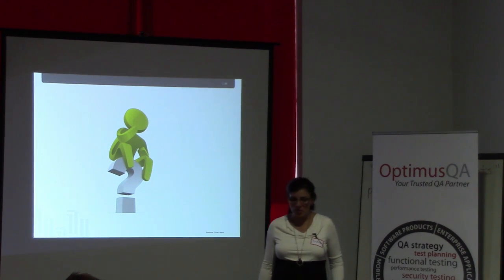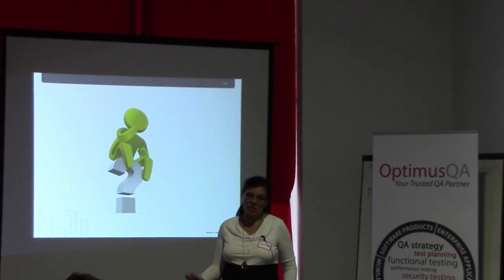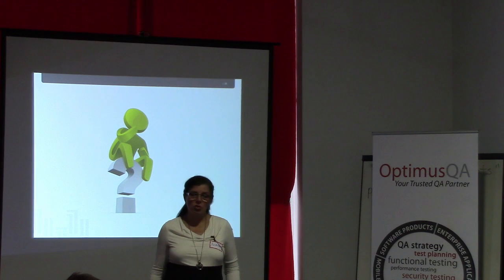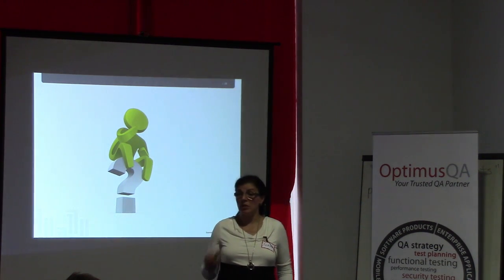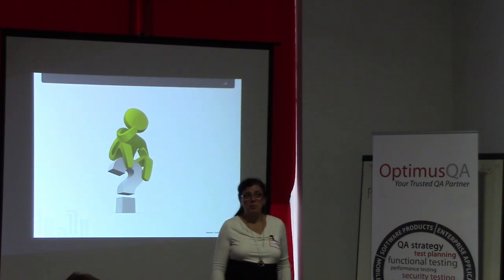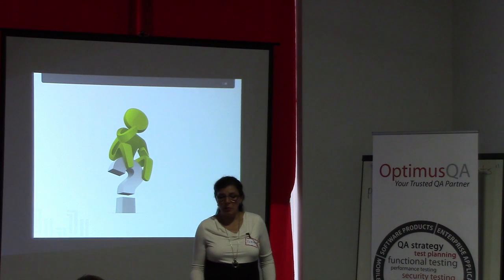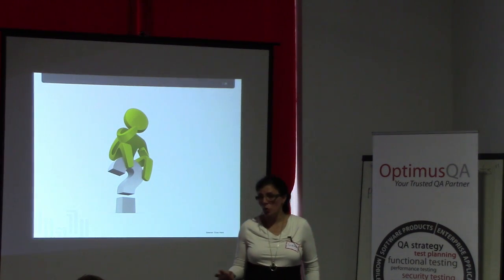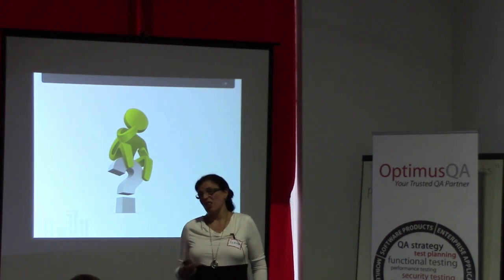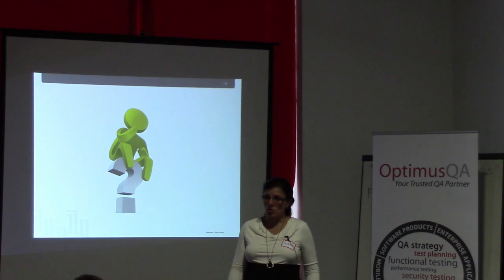So what we do, we use Inotas. Inotas is the online tool that our project managers use to fill out the demand for each project. So they will say, for example, for PFM, I need 280 hours. And the month has about 140 hours that are realistic for a person, 147, 154, depending on whether you have holidays or not.